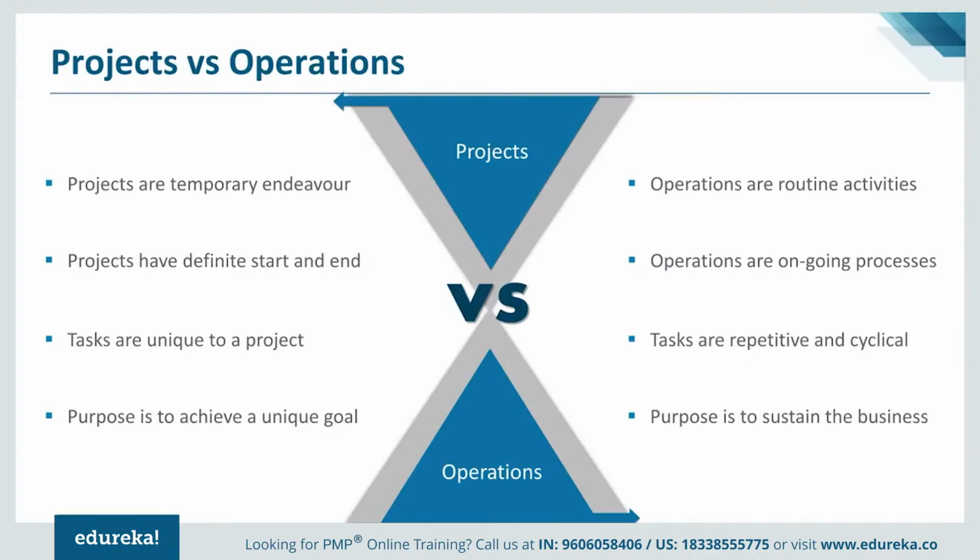However, project activities will stop once you accomplish a project to launch that IT product. So then the project is ended. What will start is the operation activities. So key here is to make sure that there is a proper handover between the project activities and the operation activities. And therefore, you will find that the operations team work very, very closely towards the end of the project.